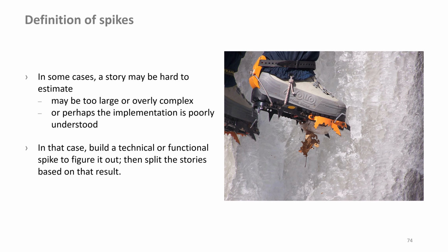Let us see what makes the definition of spikes. Spikes are an invention of extreme programming. They are a special type of user story. With them, we can gain the necessary insights, reduce the risk of a technical approach, better understand a requirement, or increase the reliability of an estimate.